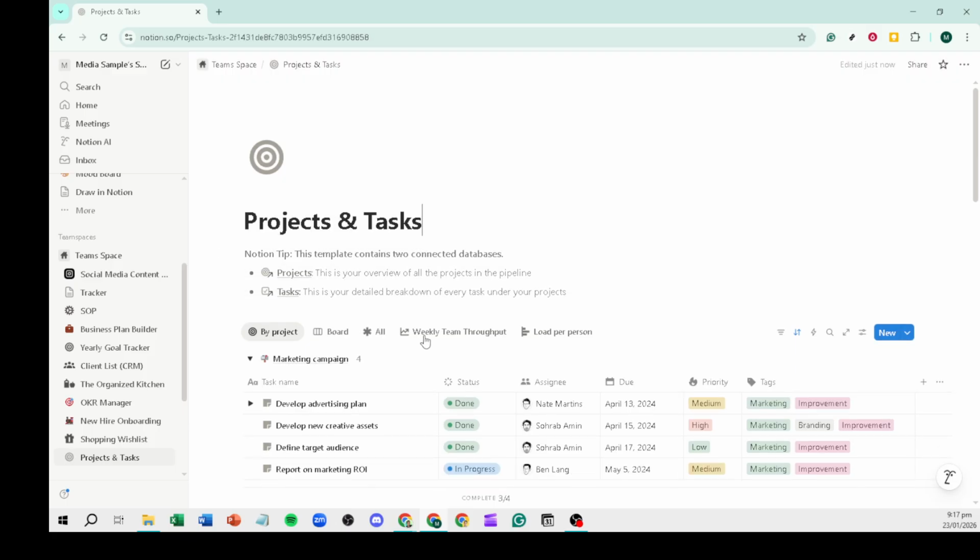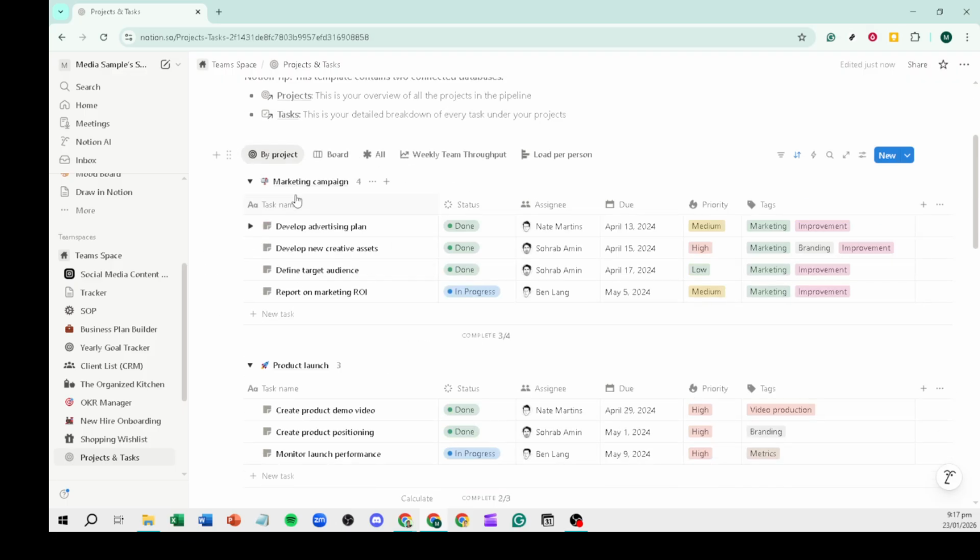For progress tracking, add a number property formatted as a percentage. You can manually update it, or if you prefer automation, use a formula later to calculate completion from subtasks. Either way, this gives quick visual feedback.